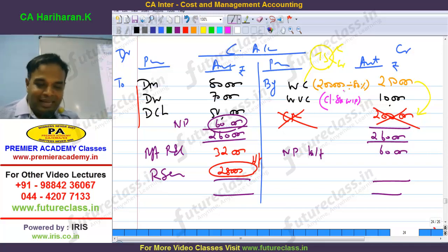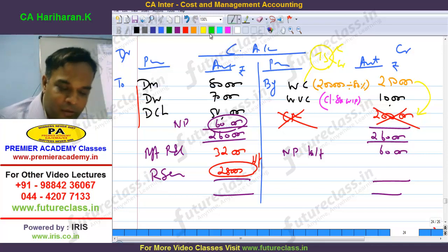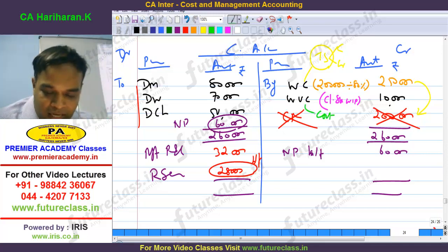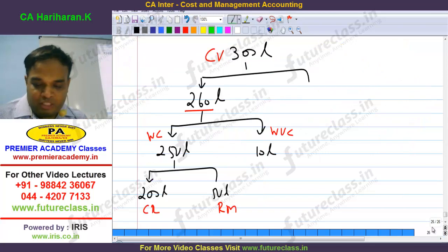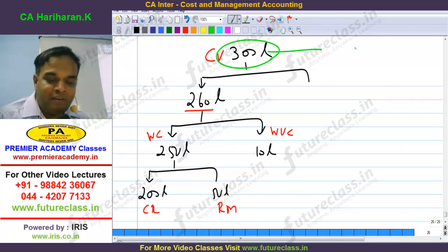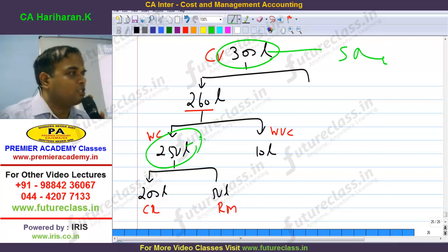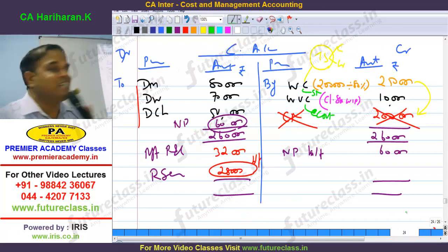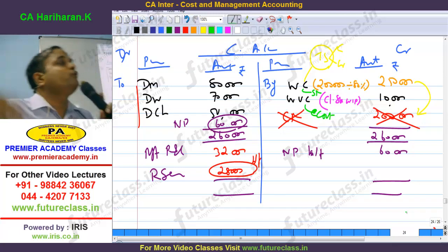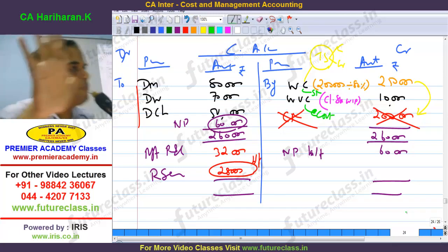So work uncertified we always have to value at what? At cost. Whereas work certified is at the sales revenue. Even if you look at the chart, 300 lakhs contract value is sales revenue, no? So part of the sales revenue I have got. Am I right or not? All of you with me? Therefore, it's similar to what? Sales revenue. A portion of the sales revenue I am getting well in advance, because work is fully completed, I can get the full value. Are you with me?